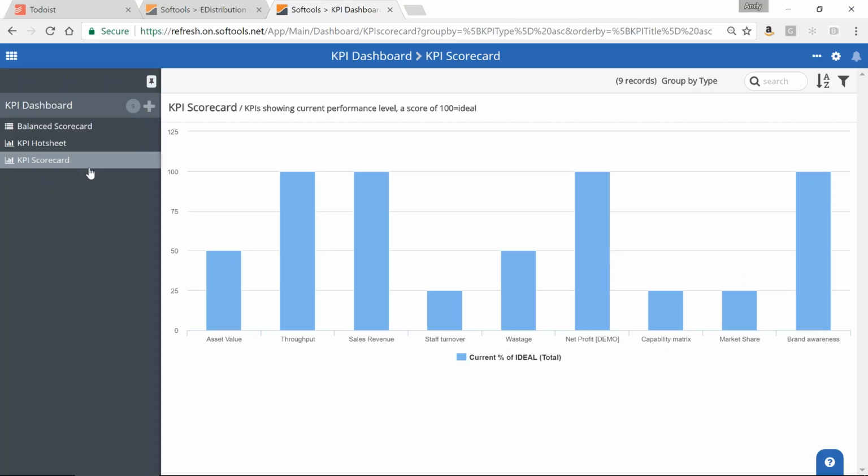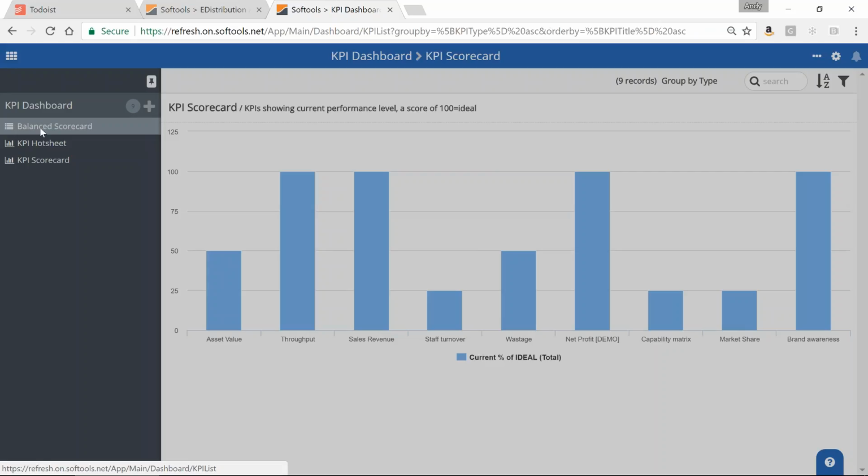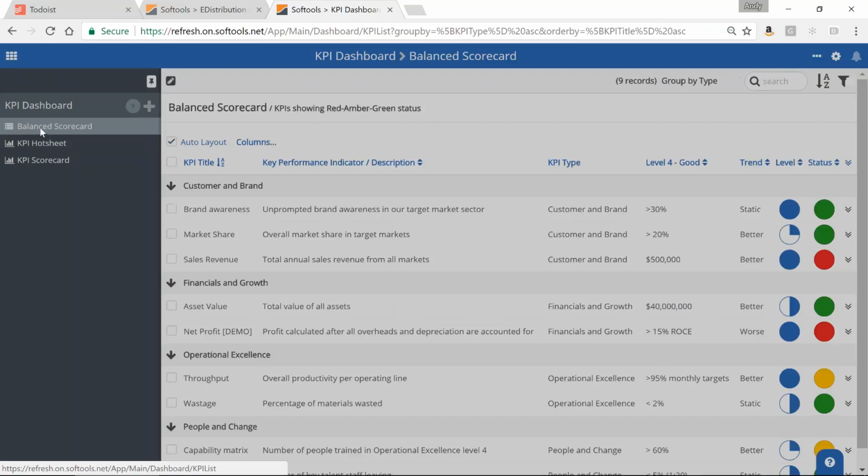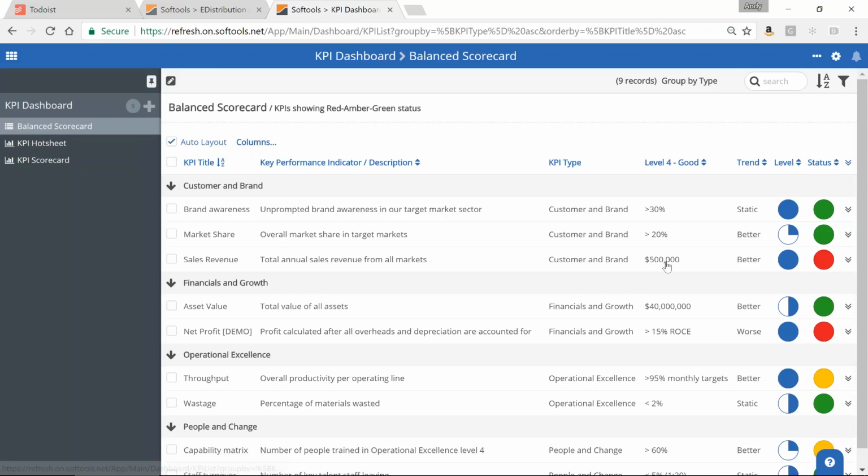And of course, with each of the KPIs, wherever we've got a red or an amber indicator, it tells us that we have some concerns. And so for each red or amber indicator, we would expect to see a linked RAID item that says, right, how are we going to track the actions to actually progress from the red and turn it back into a status green. So that's an example of an application.